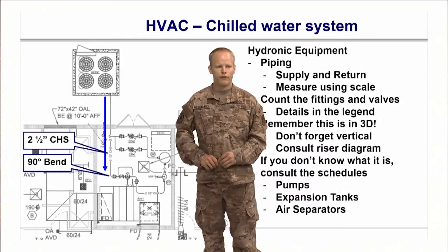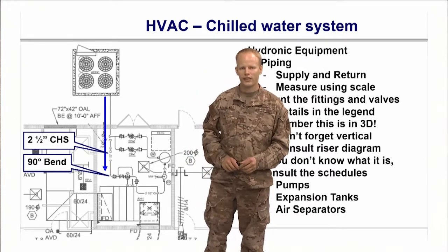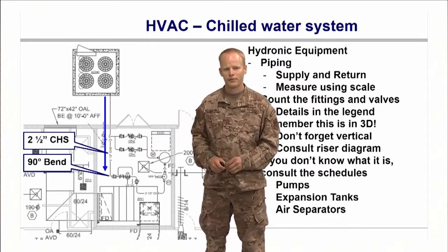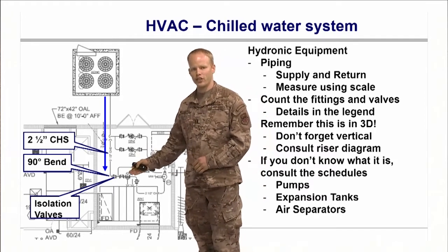And then you're going to have your fittings. You're going to have a 90-degree bend in there. You're going to have other things such as tees over at this point. So account for your fittings. And you're going to come across various valves. So you have an isolation valve right here.